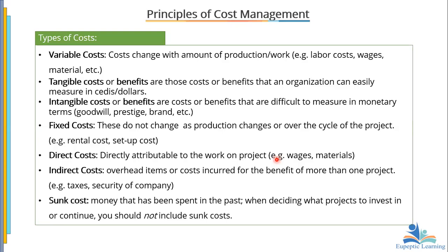So you are building a house, and then maybe at a certain point, there were some litigations and you had to go and settle some people. Now, if you are selling the house, you cannot add that money to it and say that it is the cost of the house. Or before you built, you had to go and see certain people, and all that before. No, you can't add that. That is a sunk cost. So be very careful of sunk cost while you are costing on your project.